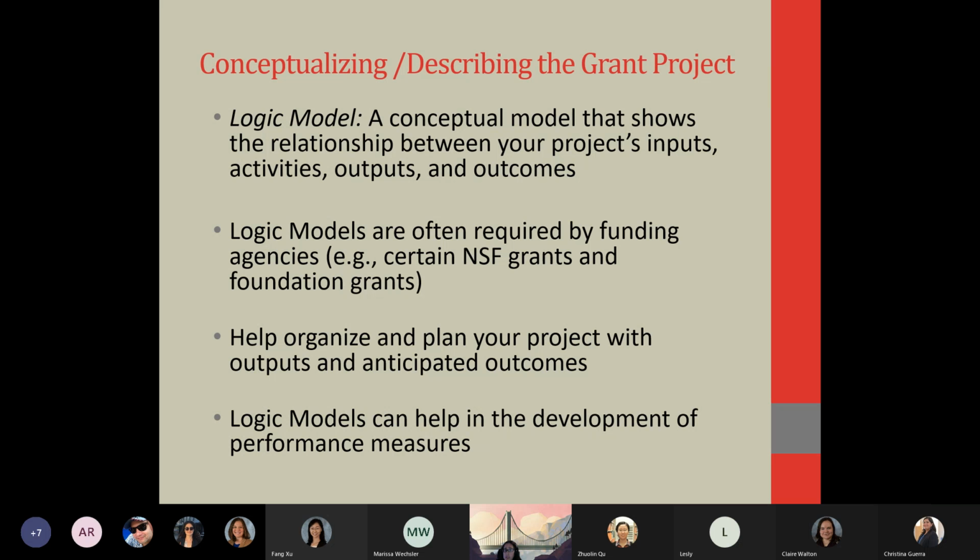So a logic model is a conceptual model that shows the relationship between your project's inputs, activities, outputs, and outcomes. Logic models are important because they're often required by funding agencies, as I mentioned earlier, and they help organize and plan your project with outputs and anticipated outcomes. Something else that logic models can help with, not just in conceptualizing your project, but they could also help in the development of performance measures.